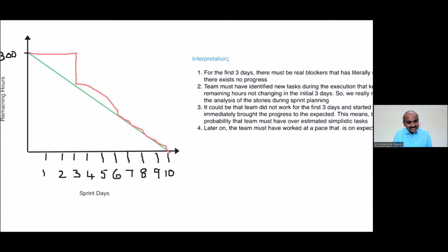That means if that is a negative sense where people have slept for the first 3 days and then on the third day they brought it down, that means they have overestimated the effort. So they have actually taken first 6 days, or from third day to 10th day, 7 days work only they planned. First 3 days work, they did not plan. There's a problem.